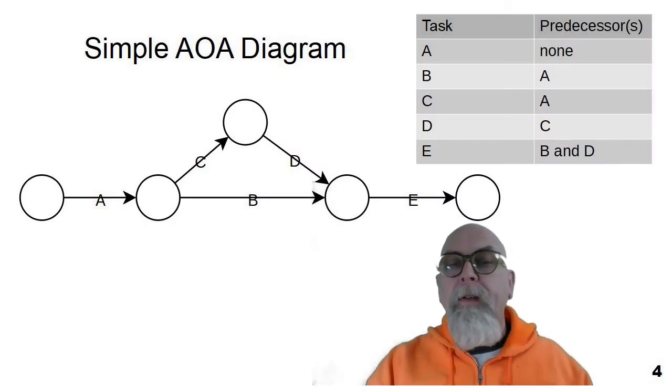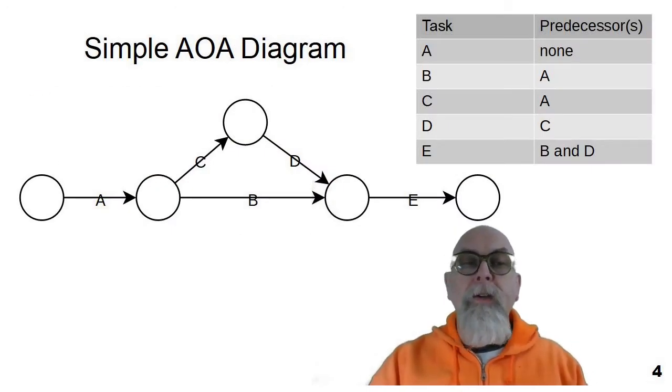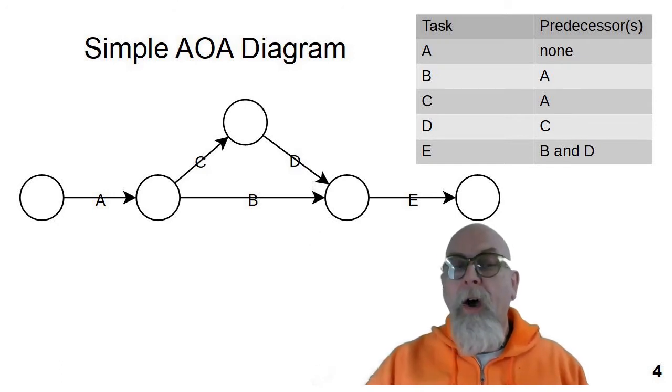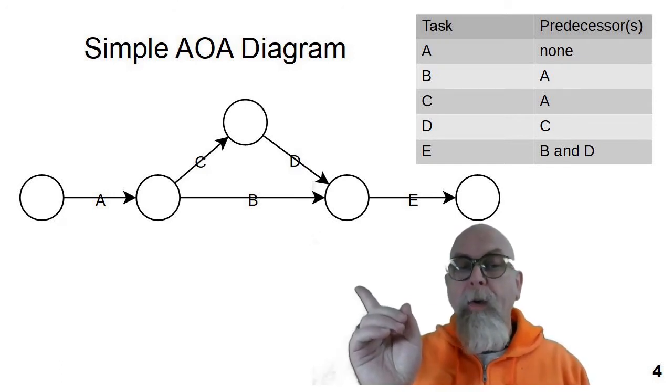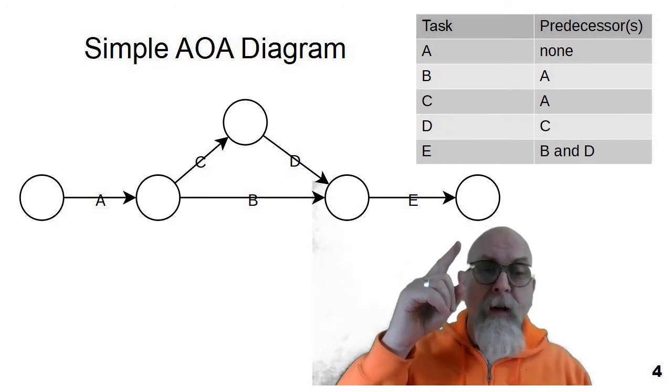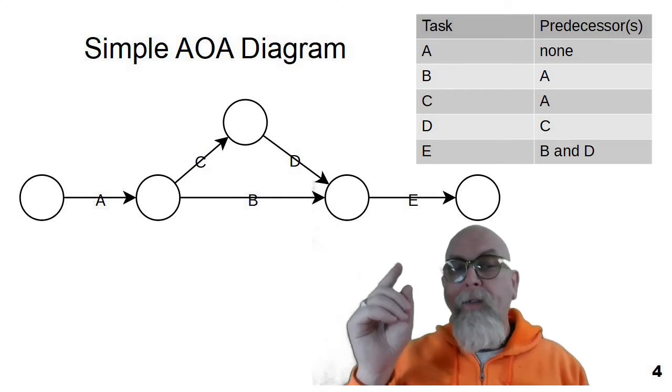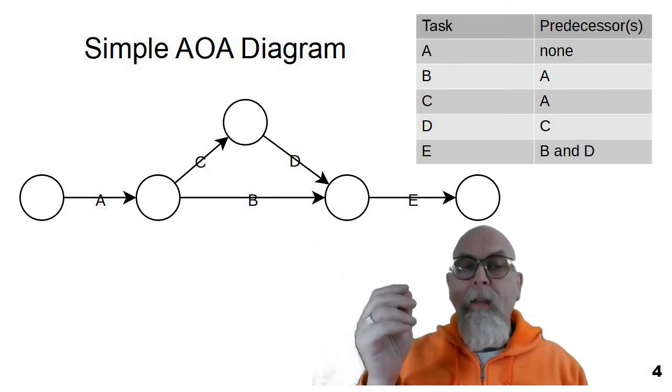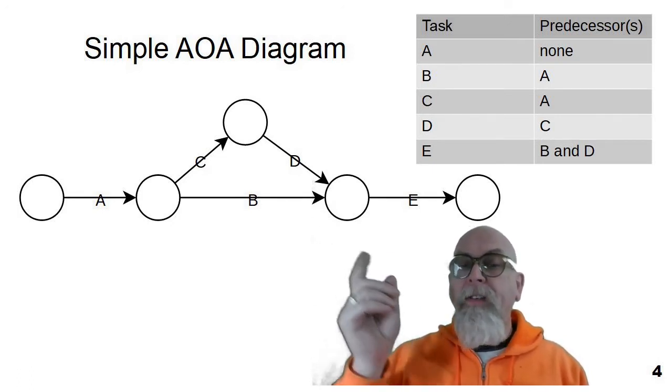Here we can see a simple AOA diagram. You can see that the tasks lettered A through E are represented by the arrow. So the first node over here on the far end represents the start. This node represents the terminus node, the end. And these nodes each represent a state throughout the network diagram.